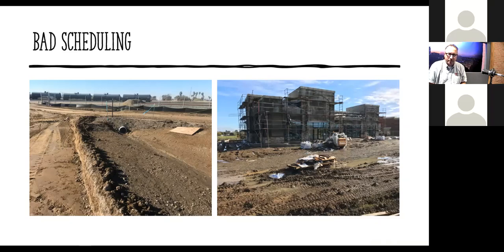And the contractor had to over excavate this road several times during the wet season, just in order to get vehicles in and out of the project. I mean, that's an expense. That is an inefficiency. That's something we're trying to avoid. And so having those conversations with the client will help do that.